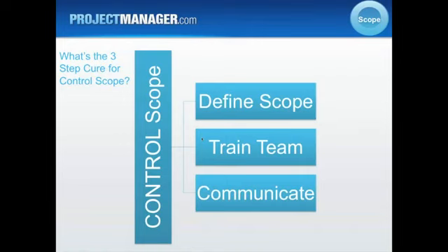So acknowledge their request and explain that they, being the customer or the owner of this, have a process and require you to follow it, and that you can direct them to their change control member. You can either take the request, but typically in working with client organizations, they like those requests to come through them. If you think of a change control board, you're the project manager, you are on the change control board, as well as the others. Remember the stakeholders, those are the people who are authorized to evaluate and approve the changes.